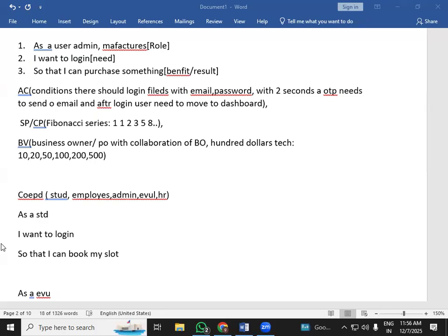Then we have the sprint review meeting, where at the end of these 2 weeks, they move the working feature to a stakeholder for review, and based on his feedback, whether we need to add a few things to it or not will be determined.